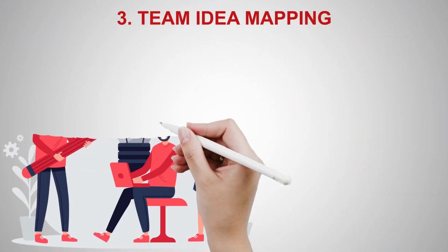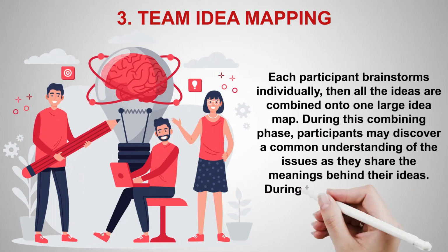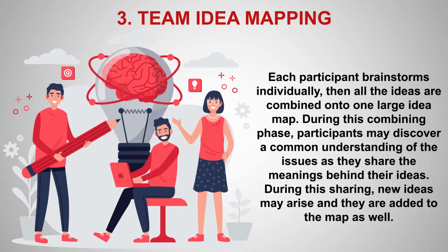3. Team idea mapping method. Each participant brainstorms individually, then all the ideas are combined onto one large idea map. During this combining phase, participants may discover a common understanding of the issues as they share the meanings behind their ideas. During this sharing, new ideas may arise and they are added to the map as well.